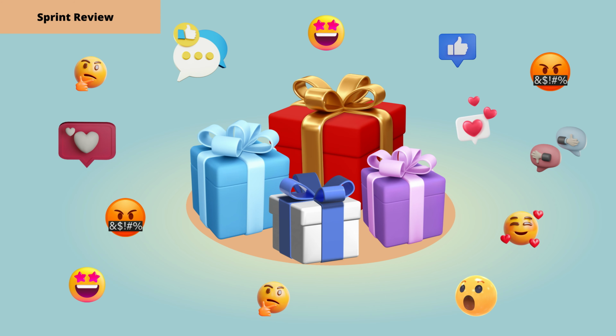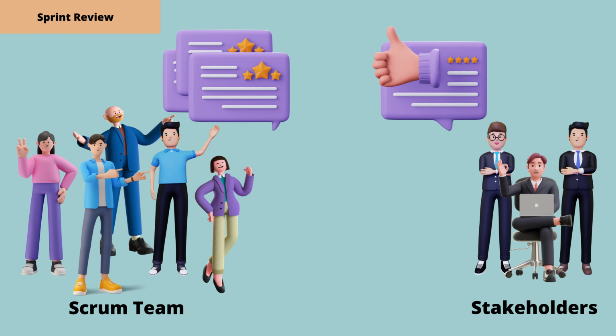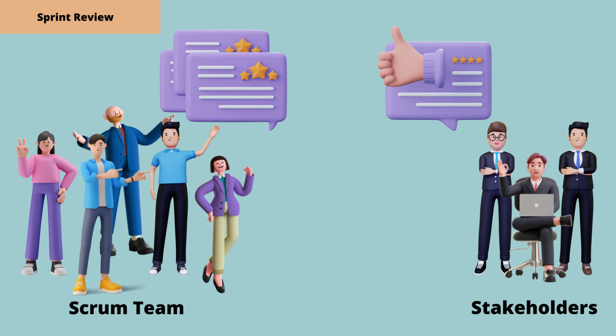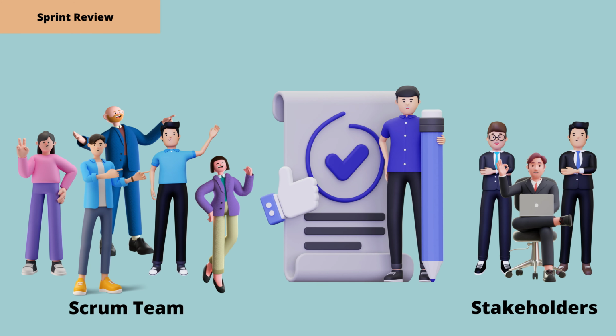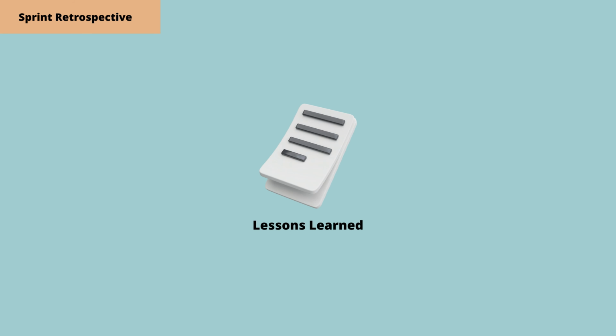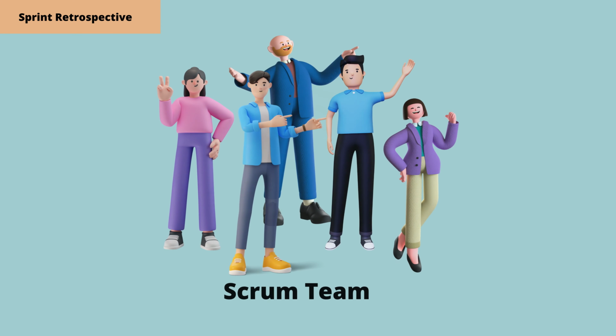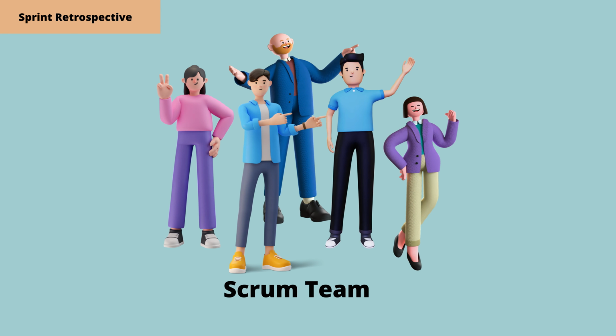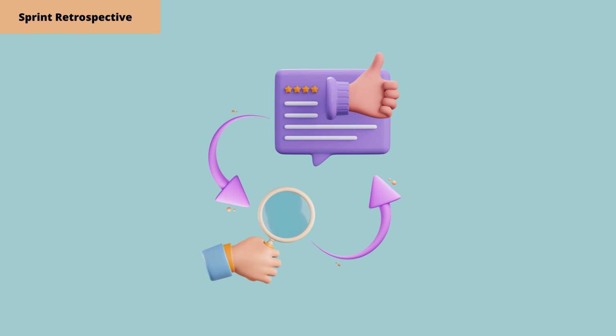And this information is going to feed into your review session and for your sprint planning session, so you know what to build for the next increment in the next sprint. And at the very end, there is also a lessons learned meeting. Now, this is called the Sprint Retrospective. It's a chance for the Scrum team to get together and discuss process improvements and quality.